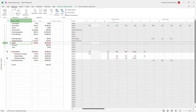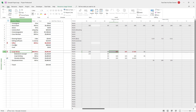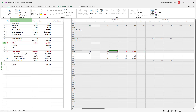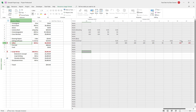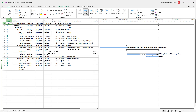If you go to a resource, you can see the editor and all the over-allocated resources. Once you select the first over-allocated resource, you can click 'Next Over Allocation' and it will jump to the next one. You can also click 'Scroll to Task' to see the over-allocated time. This makes it much easier to manage resources and identify which are over-allocated.